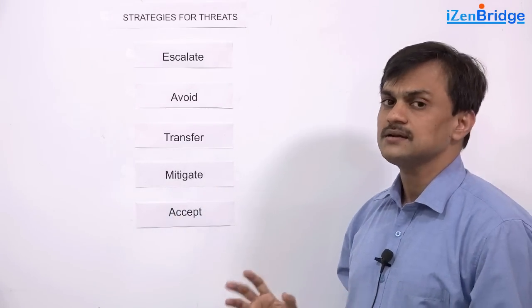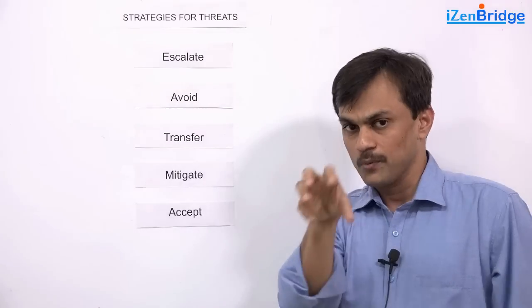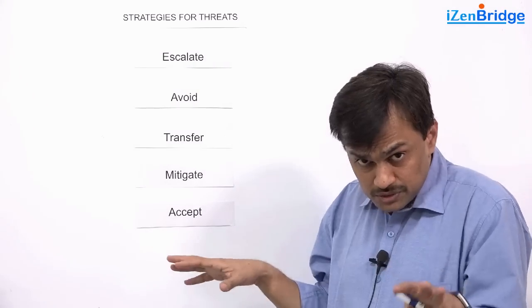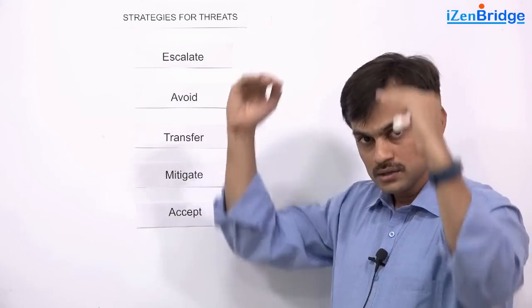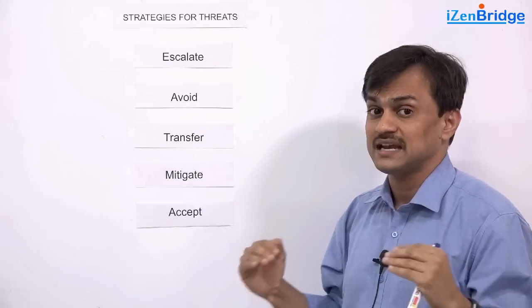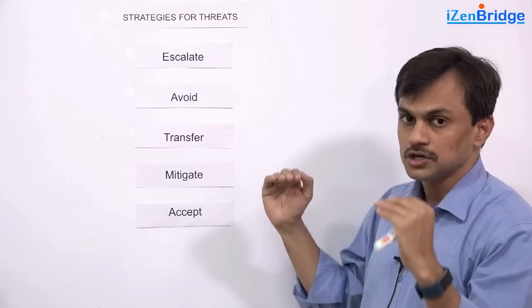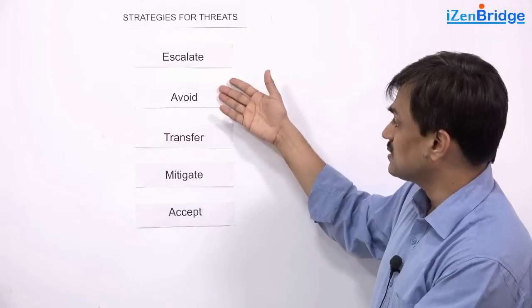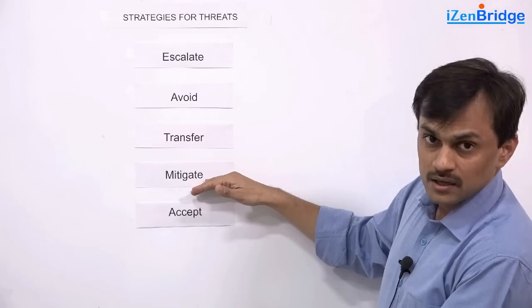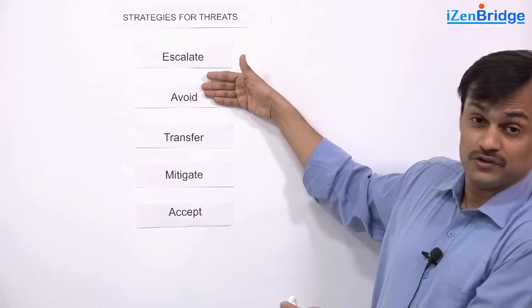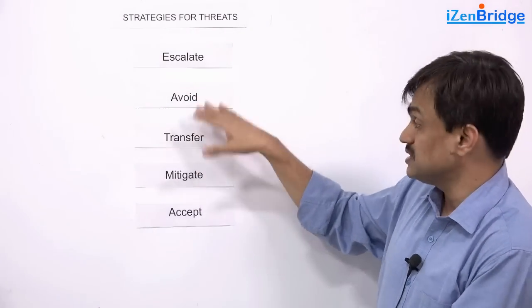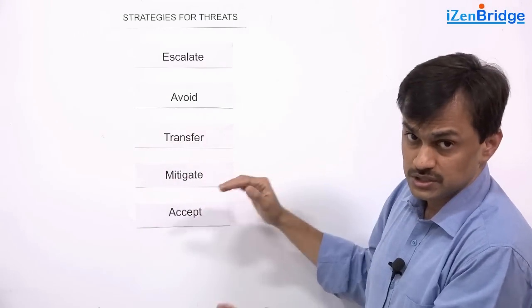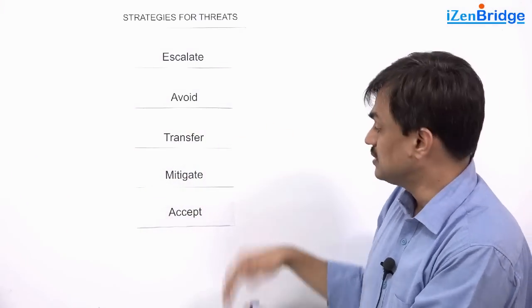Mitigation is either attacking the probability part of the risk or impact part of it or maybe both, little little both, so that overall the danger which is associated with that negative threat gets reduced. You do this the maximum. First, you try to avoid. If something cannot be avoided, you mitigate. Either I want to make a probability zero if it can be, especially for critical risk. If I can't make it zero, if I can't make the impact zero, I may try to reduce it and judge can I live with that.